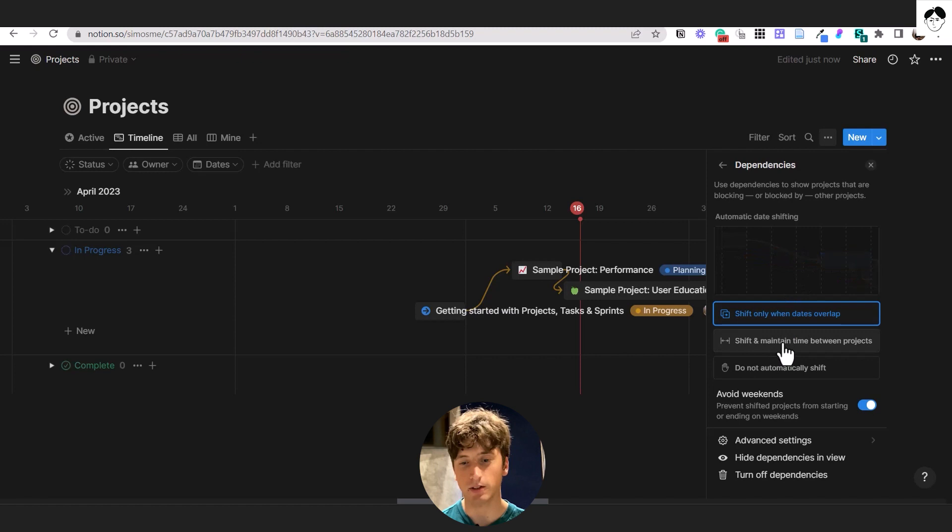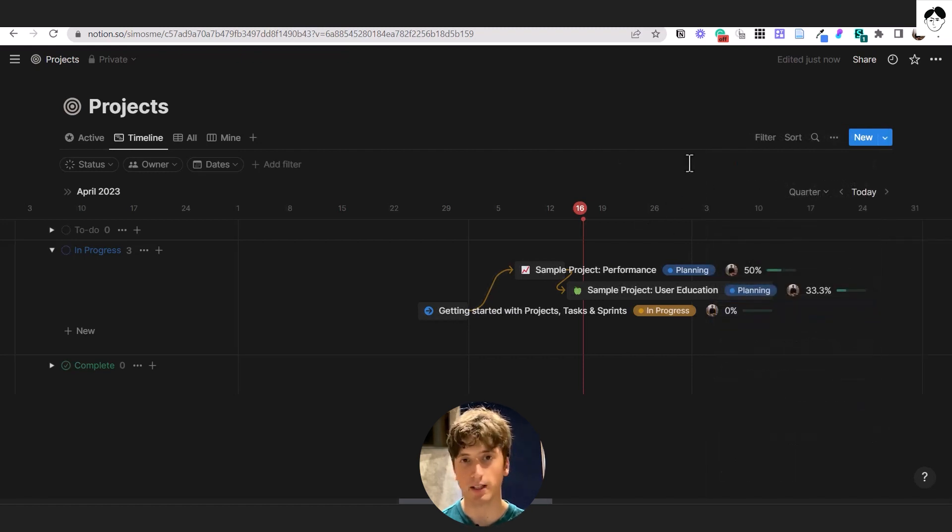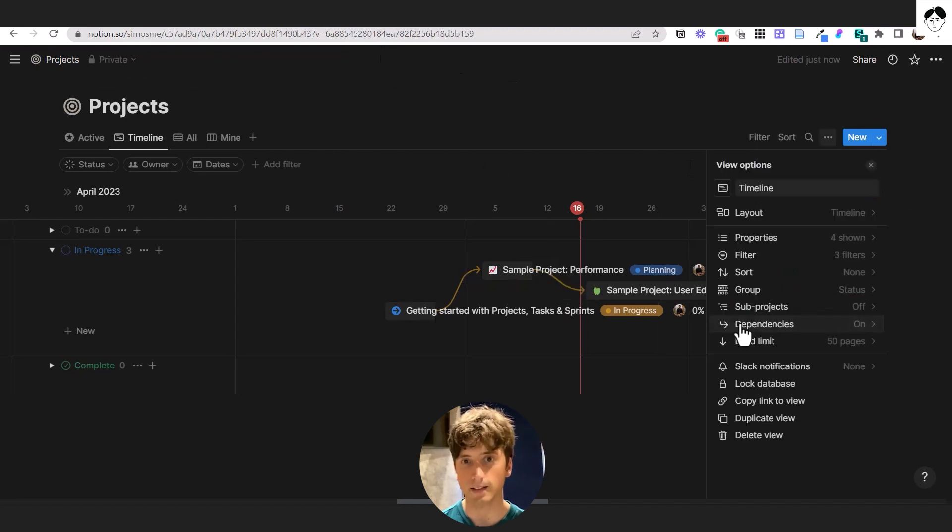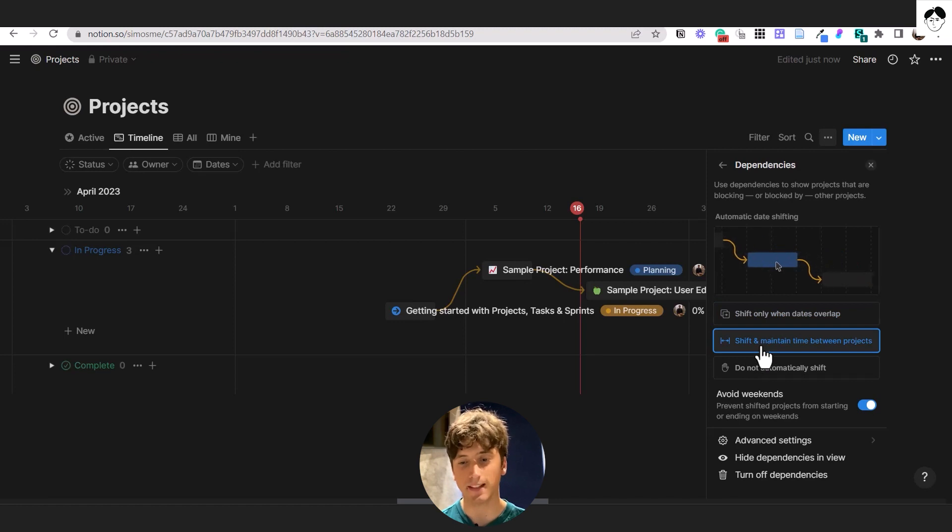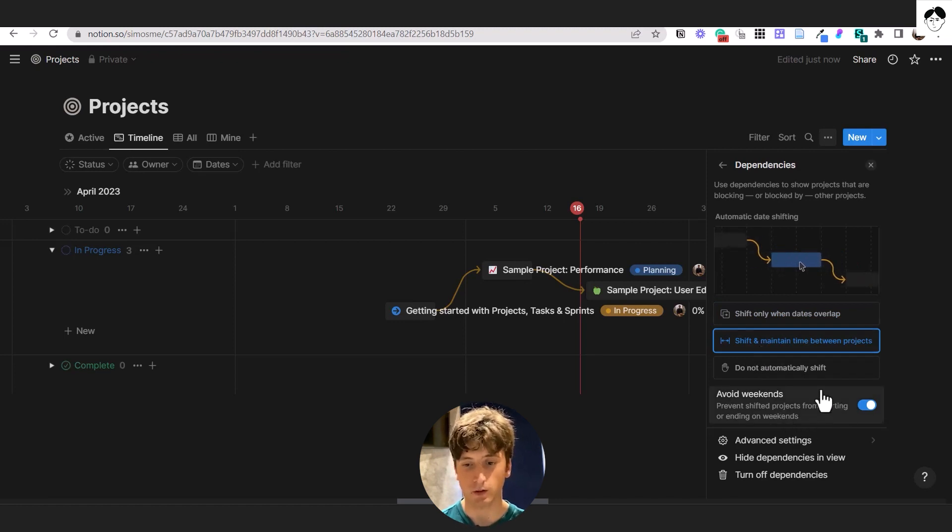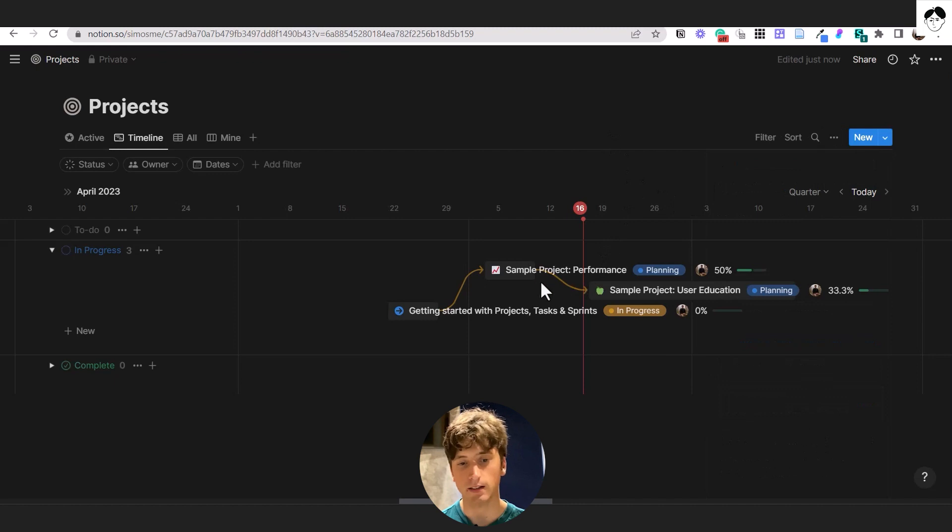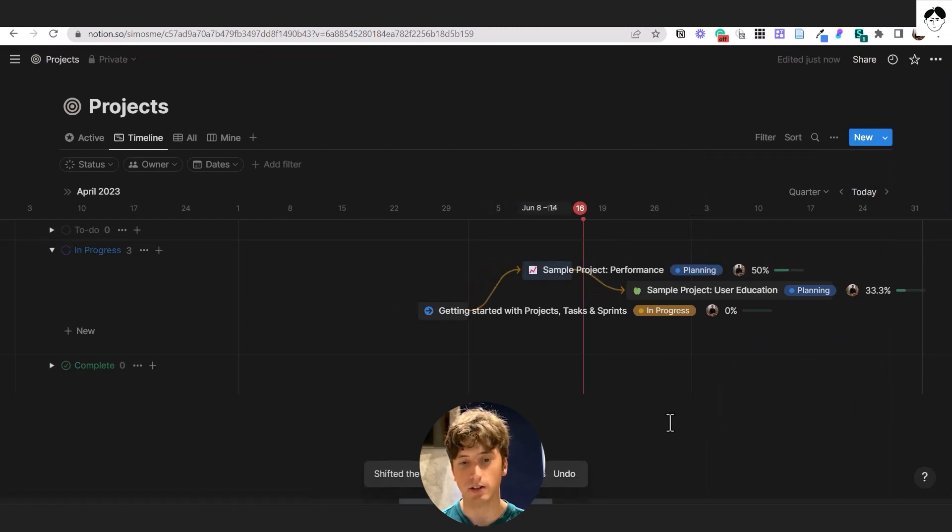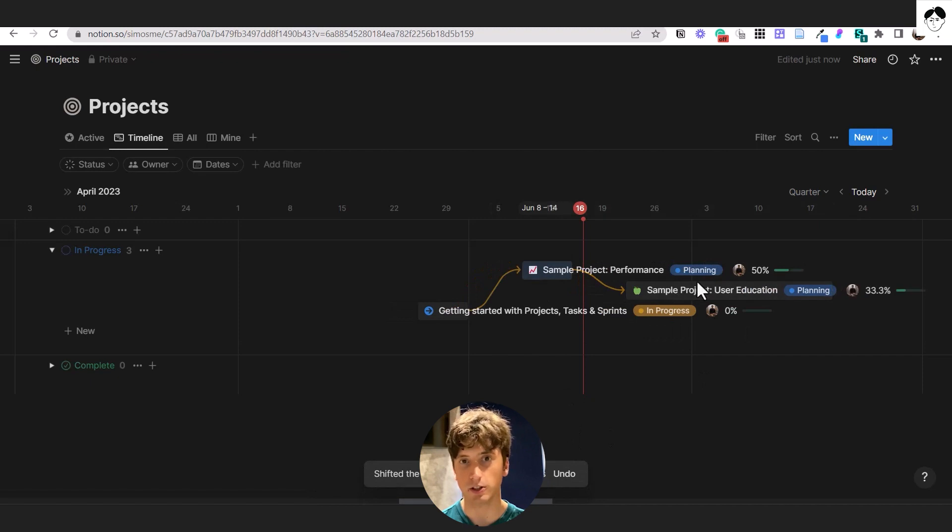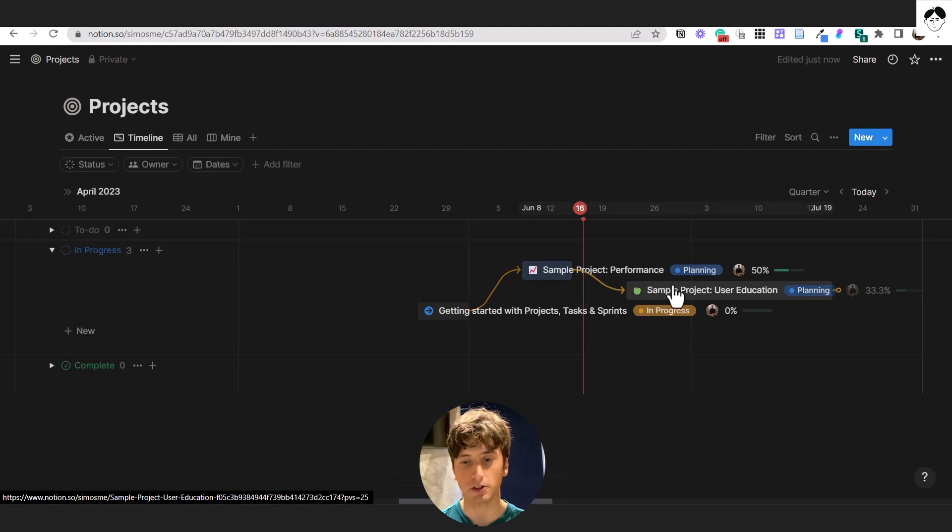The second shifting behavior is to shift and maintain time between projects. So let's go back to the original configuration. And we open dependencies and select the second option, shift and maintain time between projects. We want to avoid weekends this time as well. And if we shift this product performance like that, you will see the sample project user education that is dependent on sample project performance will be shifted automatically.